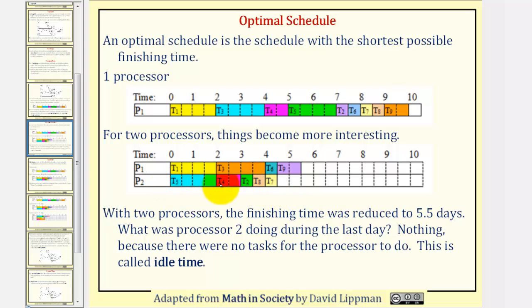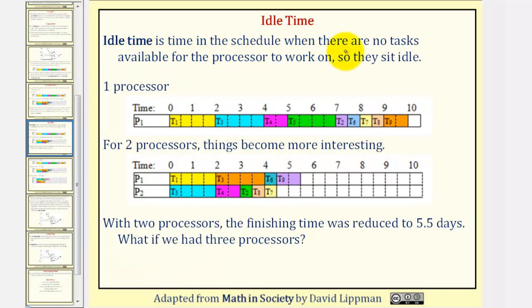But you might be asking, what did processor two do during this last day? Notice how they're not completing a task, and therefore the processor is doing nothing. This is called idle time. Idle time is time in the schedule when there are no tasks available for the processor to work on, so they sit idle.